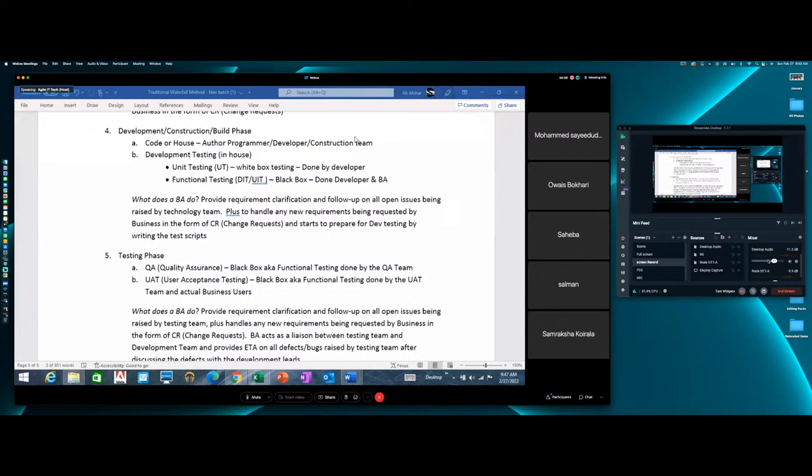Right. How did you come up with 40%? What is 40% based on? Nothing. So you just gave me a number out of the sky. No, you have done something. Basically, how many units need to be tested and how many have been done? 40%. That's what I mean. What do you mean you're not supposed to send it? You work for me. What do you mean you're not supposed to send?